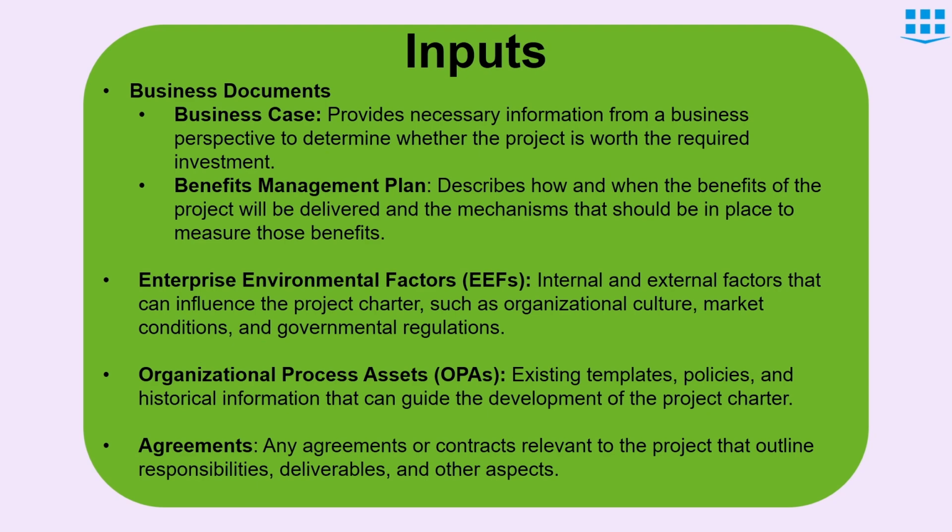Next, we have enterprise environmental factors or EEF. These are internal and external factors that influence the project charter, such as organizational culture, market conditions, and governmental regulations. EEFs can directly or indirectly affect the outcome of the project. They can cause delays, like, for instance, a government regulation increases the tax on a product that needs to be procured. This would eventually increase the cost of the project.